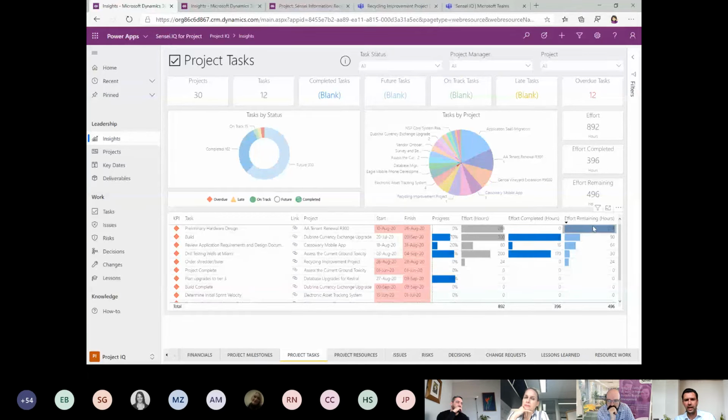So start to see where things are expected to have higher spends, but there's no progress against this yet. So they'll be forecasting this for the next period. So it's something that we might have to jump onto ahead of time to make sure that this is actually going to occur, and we do have these costs coming through.